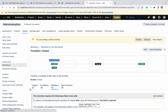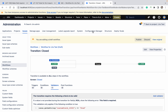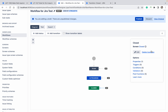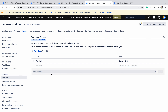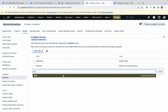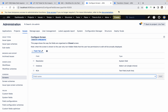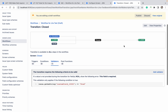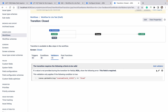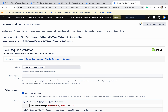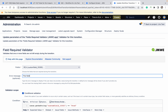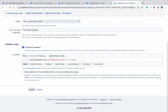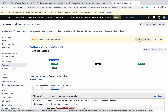Instance is Prod, then I want to make the field required. Just add it, go down, click on Add, click on Add, click on Add. In this screen, add RCA as well. Do you want to add the error message? Do you want to make the asterisk? Let's add it. This field is required — this is the error message you can add. If you want to add the asterisk, you can also do that. Let's click on Update and Publish.